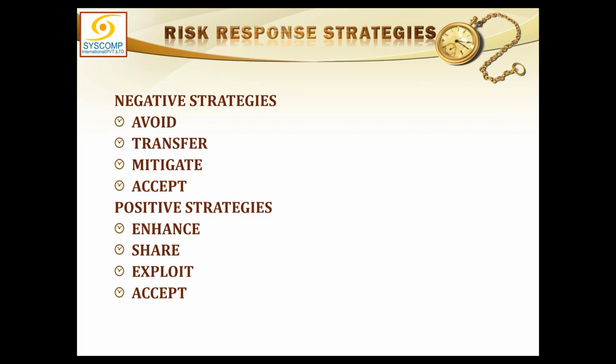Second, I don't want to transfer it to someone. I would rather like to share it with someone. I want to share the benefits of this opportunity with other people also, so they can also be benefited out of it. I don't mitigate, rather I exploit this risk.